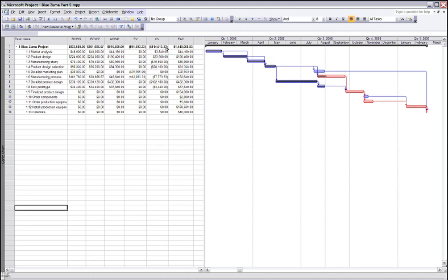As far as schedule, we have to remember that schedule variance doesn't give us any critical path information. It just measures progress in dollars, not in time units. So, you know, it gives us a good direction of where the work in the project is going. So we kind of can see this by looking at this, that our project is probably behind schedule.